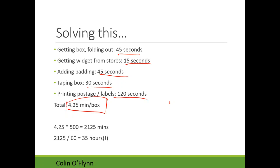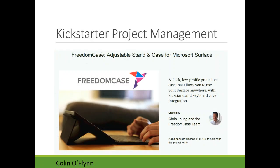Multiply 4.25 minutes by 500 and you see this would take 35 hours — basically a whole week of work, and that's without breaks or getting more materials. This is a much more reasonable estimate than just saying off the cuff 'ten-ish hours sounds about right.' This is what project management is really all about: taking a complex project and figuring out how long it will take, even if you've never done that exact project before.